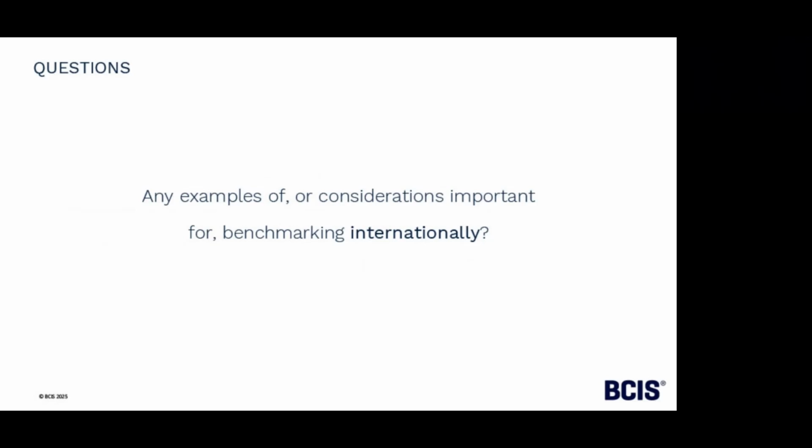There are different climate conditions. There are different building control and regulations. There are just different styles and other things. Different local materials are available. So yeah, you need to consider all of that.